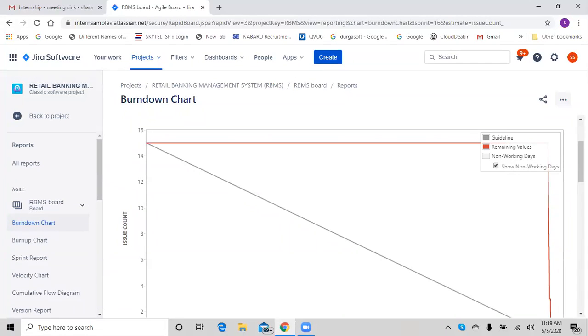Okay, as a fresher, the seniors are going to help them. Exactly. Let's say as a fresher you don't know, you may give huge values to a couple of user stories. At that moment, the senior person will suggest possibly fewer story points and justify it, giving you knowledge of how to complete it, because they have multiple standard procedures they can simply use. Reusable components, we call them. If we have standard procedures we can reuse, the story points will be less. That understanding you should provide to the fresher, and make them come to the same points. Then only you can proceed with the next user story, right or wrong?